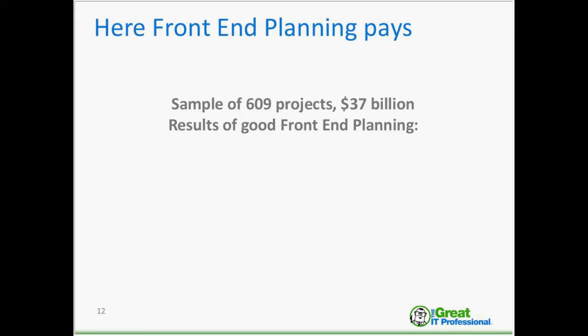Now, one of the good practices, I'm not mentioning best practice, but a good practice, if critical success factor 1 is satisfied, is to apply the so-called front-end planning. There are also other names, so you can call it front-end loading, it is exactly the same, but the idea is let's do a lot of analysis, a lot of planning before the project starts.